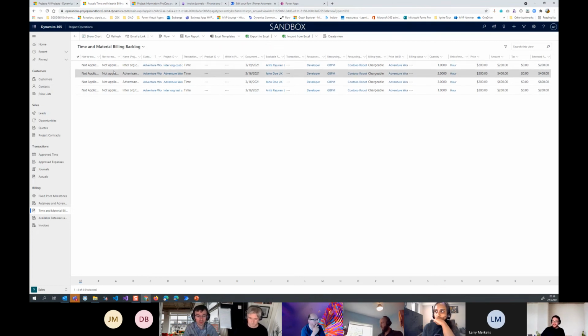So for example, for these, if I set these all as ready to invoice and I create a Performa invoice manually from the context of a project contract, they'd all get picked up because they've been marked as ready to invoice. Now, maybe there's entries here for the month of May, like we just had, and maybe the month of May should not be invoiced just yet. So the answer to that would be, don't set the month of May time entries as ready to invoice.